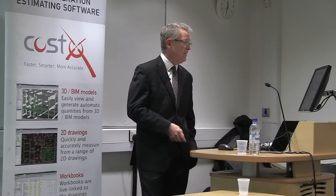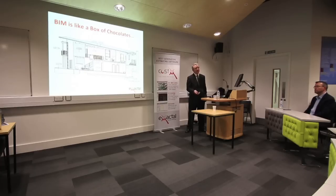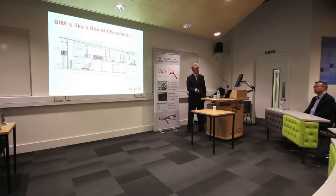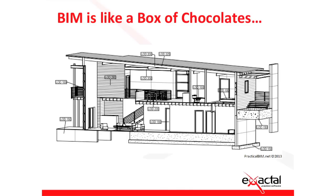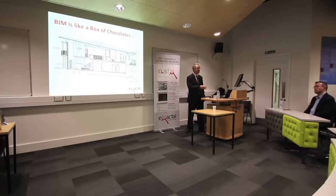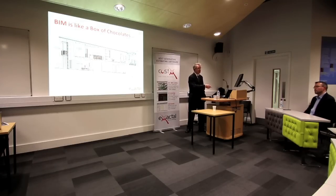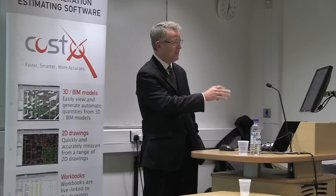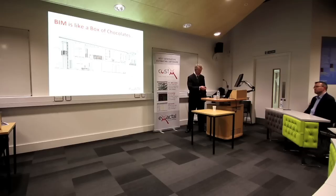When you receive BIM models, the various elements within the model will be at different stages of development and different stages of detail. Part of what you have to do is sort out the wheat from the chaff. It's all usable, but you'll need to apply judgement in pricing — whether it's a concept-style decision even though drawn in high detail, or whether the specification is actually finalised and can be relied upon.